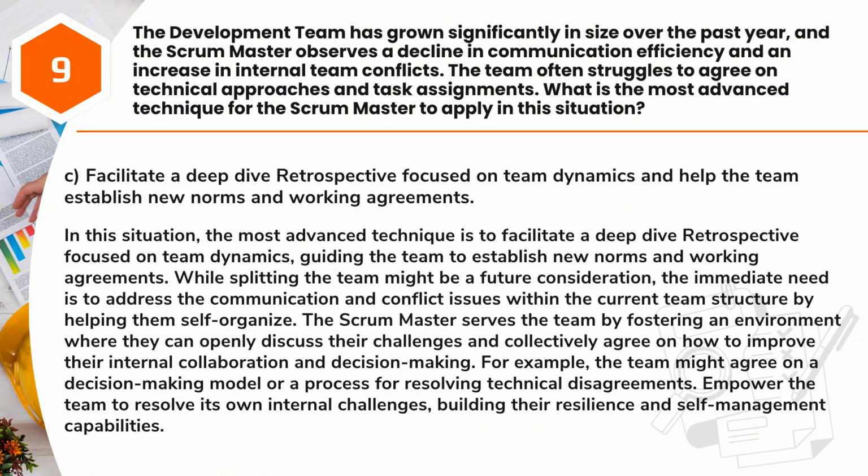Answer: C. Facilitate a deep dive retrospective focused on team dynamics and help the team establish new norms and working agreements. In this situation, the most advanced technique is to facilitate a deep dive retrospective focused on team dynamics, guiding the team to establish new norms and working agreements. While splitting the team might be a future consideration, the immediate need is to address the communication and conflict issues within the current team structure by helping them self-organize.